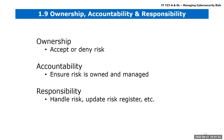The risk register is an interesting concept. For those in government, think of a POAM. ISACA consolidates risk documentation into a single risk register — capturing the risk, how it was responded to, and recommendations. Similar to a POAM in government, but ISACA calls it a risk register. It's a live document, and whether using a GRC tool like RSA Archer or any other system, you constantly need to update it.